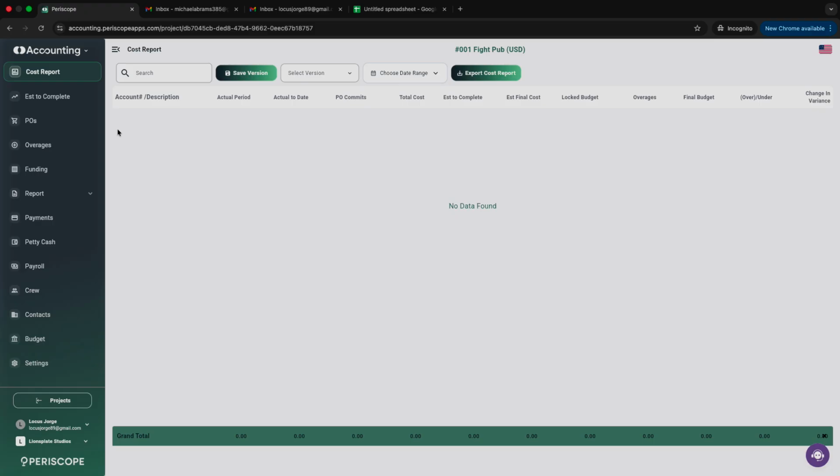This is what a producer is going to use to spot budget problems. Obviously, if the EFC is higher than the budget, then you'll know what line items are over budget and what you need to bring down, right? And then you can also see if the EFC for a particular line item is lower than the budget, then that allows you to understand that you have some room there, so you can move items to other lines.